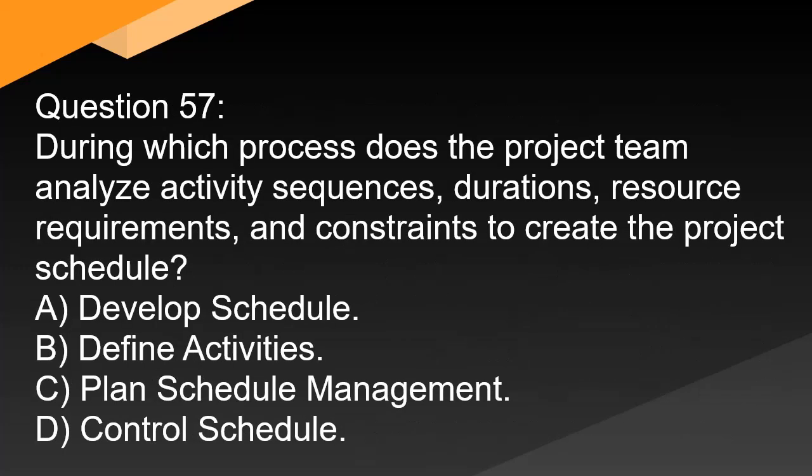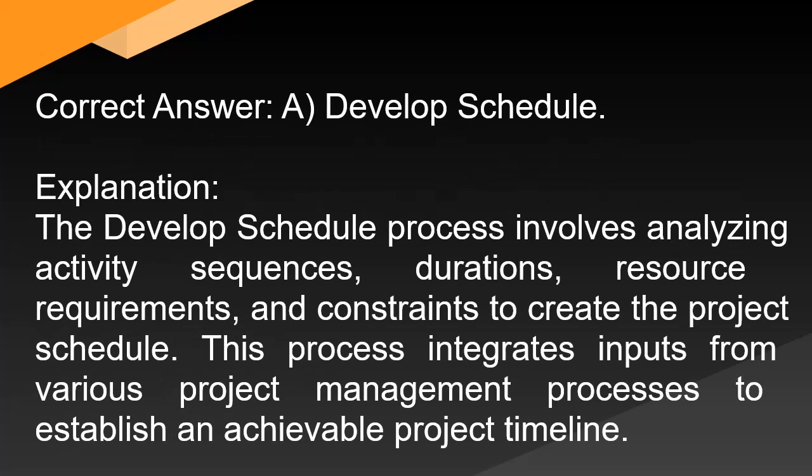Question 57: During which process does the project team analyze activity sequences, durations, resource requirements, and constraints to create the project schedule? A. Develop schedule. B. Define activities. C. Plan schedule management. D. Control schedule. Correct answer: A. Develop schedule. Explanation: The develop schedule process involves analyzing activity sequences, durations, resource requirements, and constraints to create the project schedule. This process integrates inputs from various project management processes to establish an achievable project timeline.